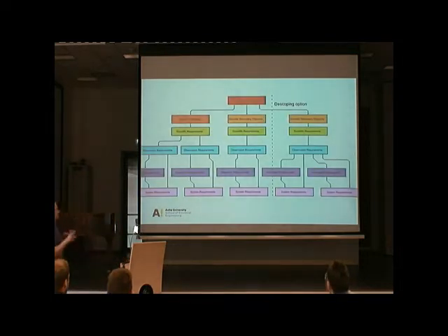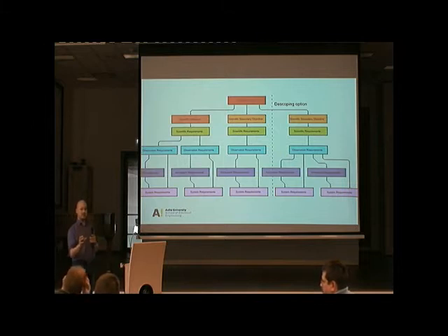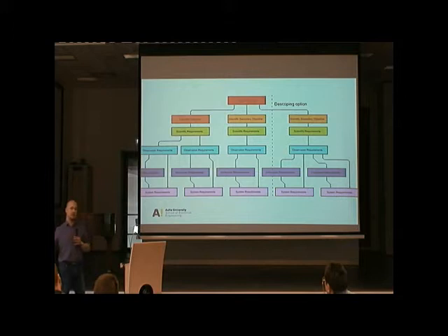So this is a project type of process for making objectives and requirements. And this is actually derived in several levels. First of all, you have a sort of scientific theme for your mission. And a scientific theme might be really, really simple. Like, let's go and measure Venus topography. One sentence, one liner. And from this theme, you actually start to work with your real scientific objectives.